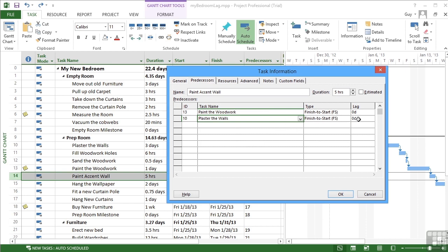However, there needs to be a lag. If I'm saying that the walls require four days to dry, then I'm actually going to put 4 ED. So not just D for days, but E for elapsed days.